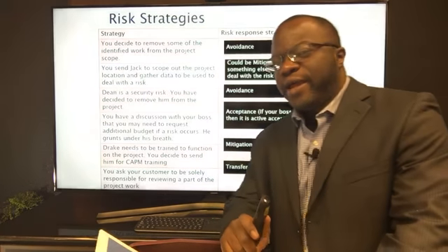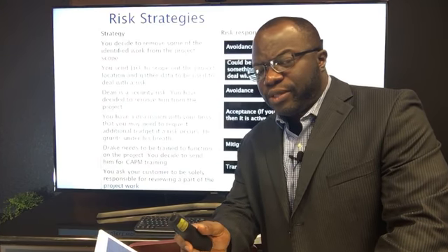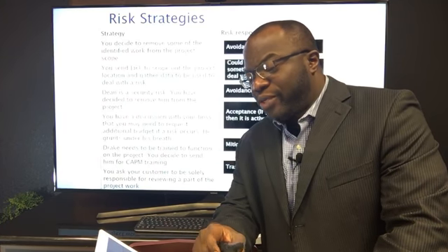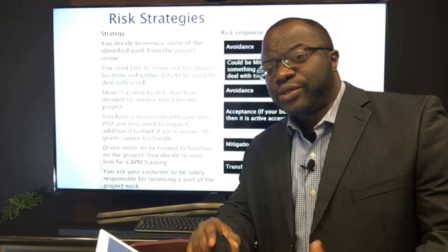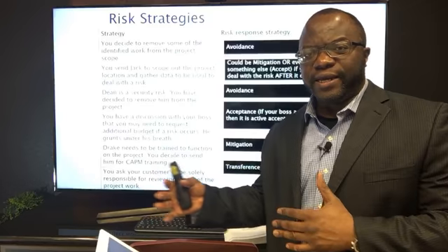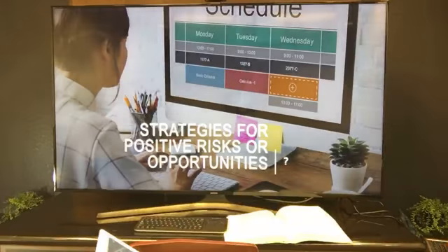So sharing is when you give some or all of the opportunity to a third party. Exploit will be to put your best resources, your best people to go to the max. But in this case, it's share, which is a little bit different. All right. Don't worry. The more you look at it, the more it's going to stick. All right. Let's move away from that.